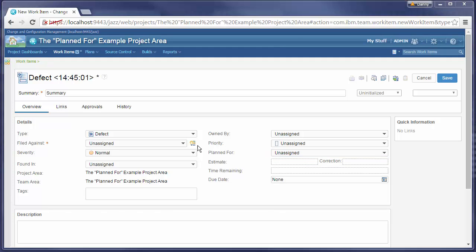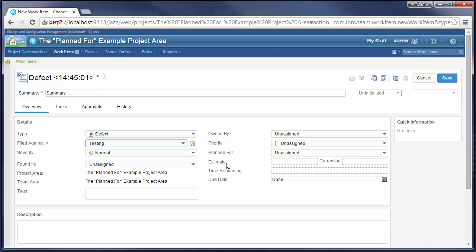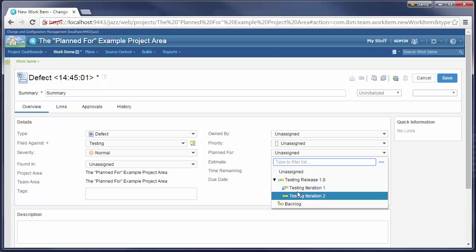If we select a category, for example testing, the Planned For drop-down will contain only iterations from the testing timeline.